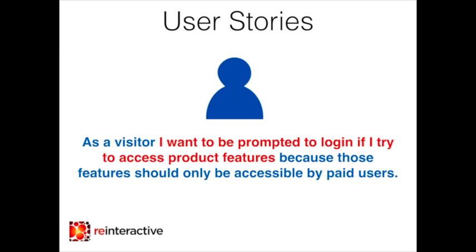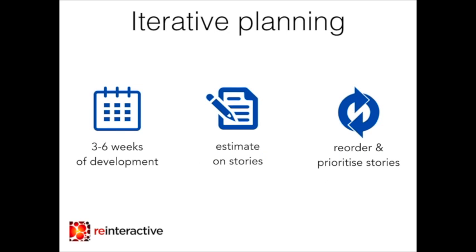And at this stage, we can just break down the stories and work with the stakeholders to nut out exactly what those stories are that we want to achieve, and we discuss them in quite a lot of depth, and we can document that in our project tracking system. And we will find that stories may get added or removed based on these discussions, and the idea is that we want to get enough idea of the functionality that we're going to be able to start estimating on how much effort's going to be put into that functionality. And that's important because of that time box period that we want to keep in mind.